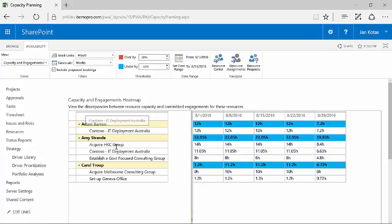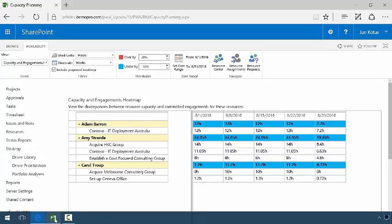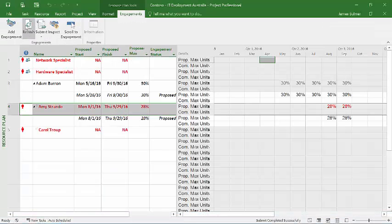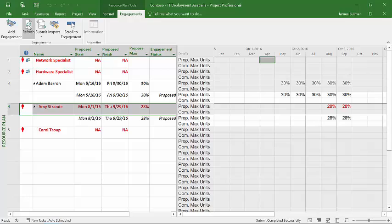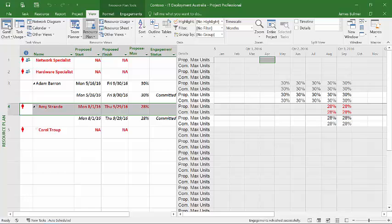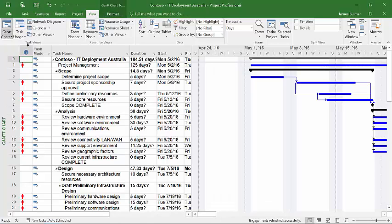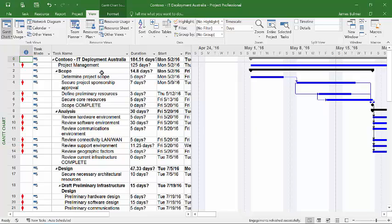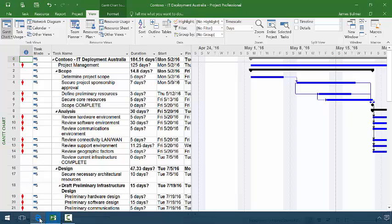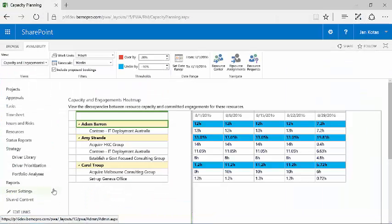Just so that you understand and have an appreciation, if I go back here and I say refresh, you'll notice that the fact that I have accepted the resource engagements, the resources are now changed to committed. So a very, very powerful feature of Project Server 2016 is the ability to use resource engagements to create resource plans so that you don't have to go and put specific resource assignments on all of these tasks. You simply decide at a very high level based on your experience what the resources are going to do.